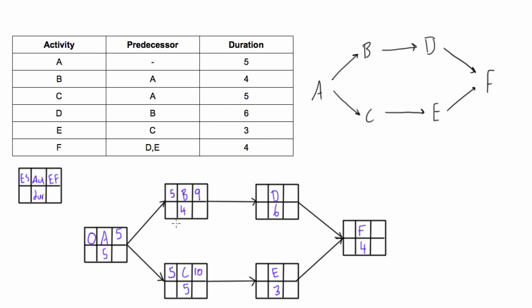Let's pause and think about this. Activity B is four days long, activity A is five days long, and activity B can't start until activity A is done. So if you add that up, you have five plus four, which gives us nine. The earliest activity B can finish is at the end of day nine, which makes perfect sense considering only these two activities.